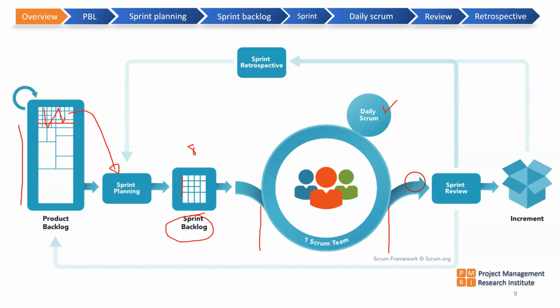At the end of the 30th day, or at the end of the sprint duration, a formal sprint review happens by the key stakeholders, and they decide whether the sprint was successful or not. Irrespective of the success or failure of the sprint, after the sprint review, a sprint retrospective meeting is performed, and the findings of those retrospective meetings are pumped back into the subsequent sprint planning meeting.